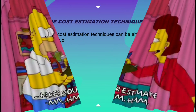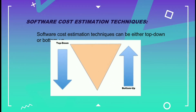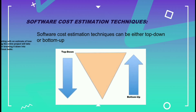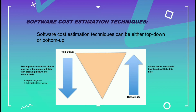Software cost estimation techniques can be either top-down or bottom-up. Top-down techniques start with an estimate of how long the entire project will take, then break it down into various tasks — these include expert judgment and Delphi cost estimation. Bottom-up techniques allow teams to estimate task durations individually — these include work breakdown structure and COCOMO.